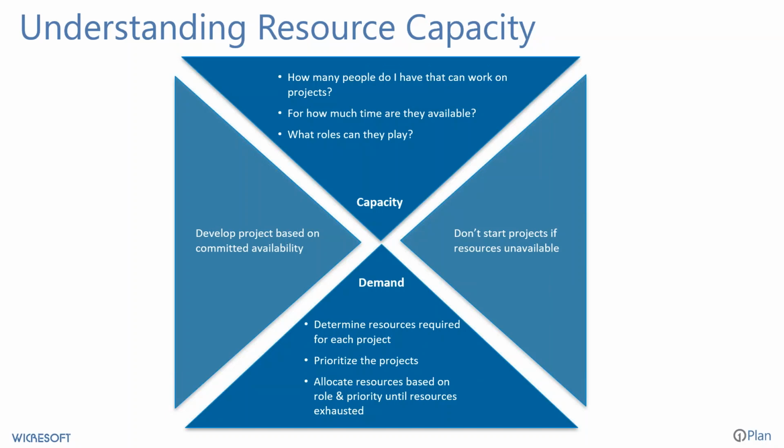On the demand side of things, we need to determine the resources that are required for each individual project that's being proposed, and then prioritize those projects and then allocate the resources based on the role and priority until the resources are exhausted. Not physically exhausted, but until they're gone, until we don't have any more.